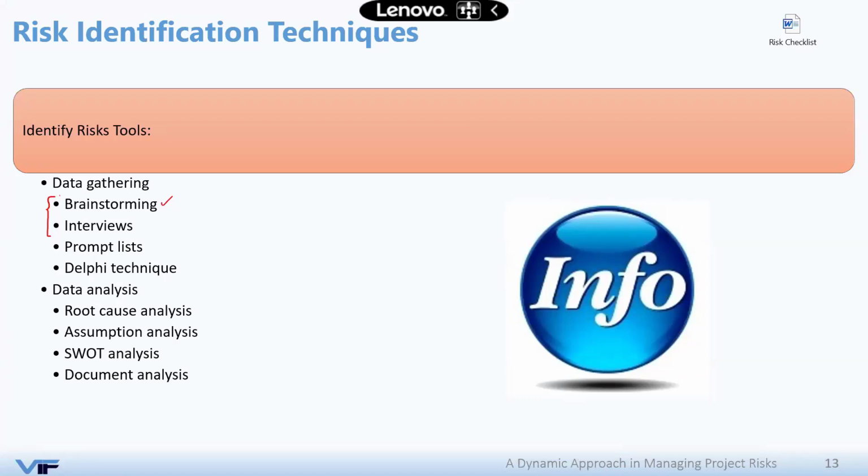And we do have a facilitator and some brainstorming mechanisms about the duration and about recording the output of the brainstorming. But you can make it more organized by using what we call a slip technique or a round-robin technique. Round-robin technique refers to a very organized method of brainstorming. So you start by each individual on your project team and ask them, what do you think are the risks that can happen on this project? So everyone is allowed to share one idea at a time